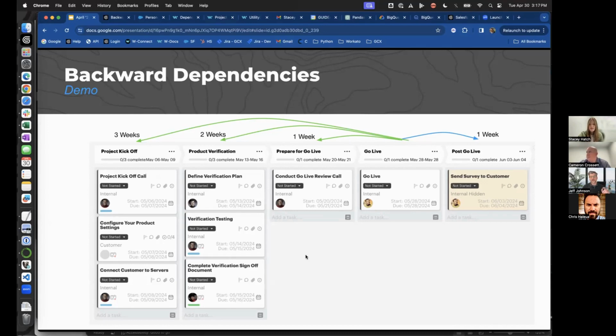But if I'm understanding the question correctly, one thing that the recipe does is it removes the dependency of the task that it's monitoring. Notice there's actually no dependency on go live here. And it removes the dependency on the task that it's updating. It does that just so it can do what it's designed to do, set those dates itself and not make those dates dependent upon something else.